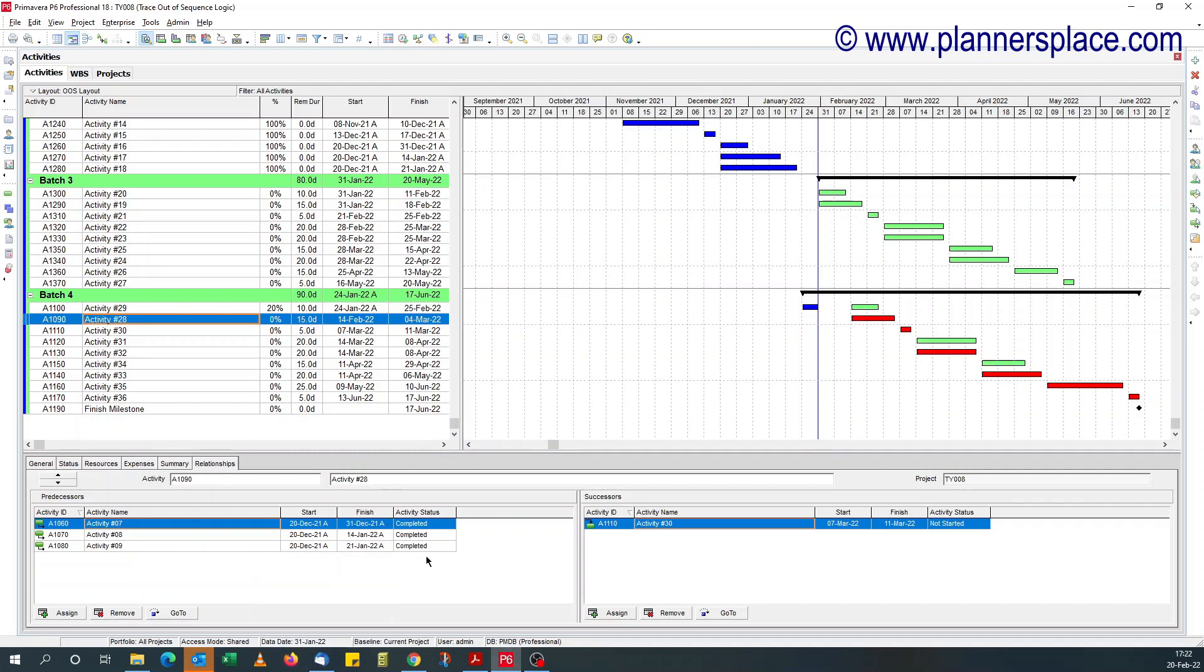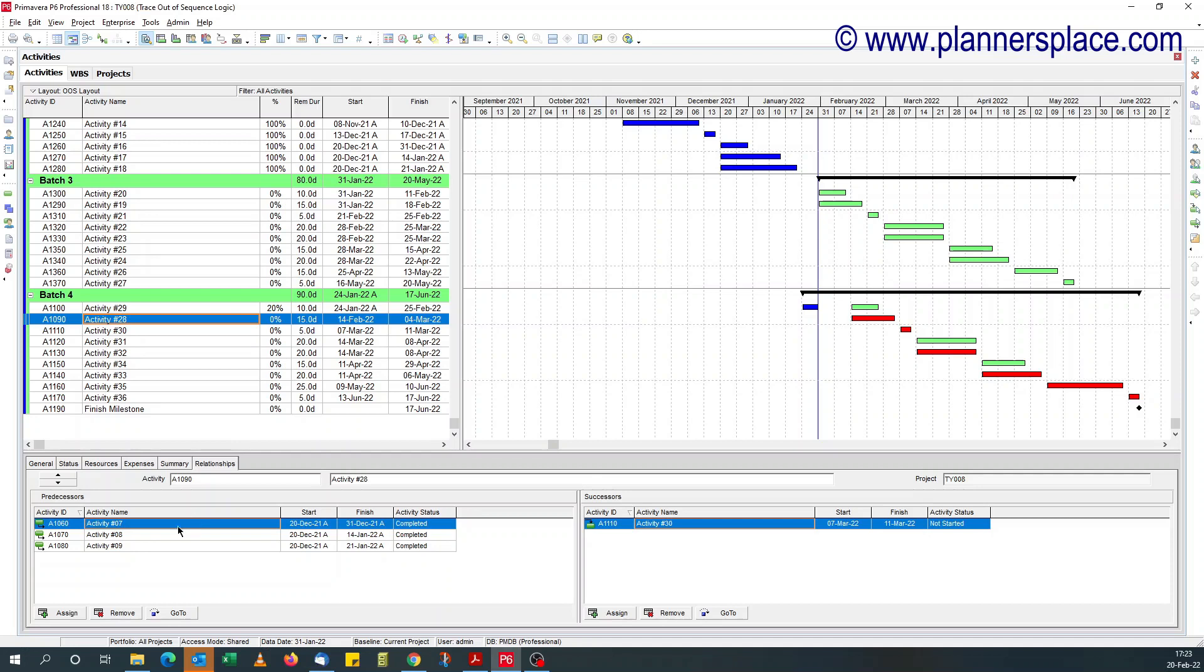So the trick lies in this activity form on the relationship tab. What I need to do is add two fields, two date fields that will help you, basically just one should be fine. Add the date field in the predecessor tab of the relationship tab.